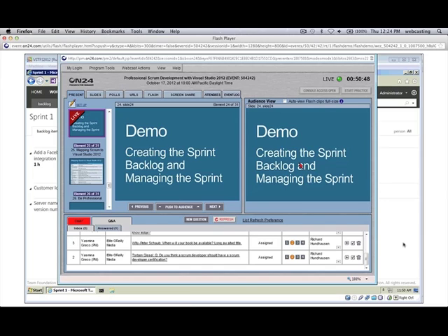Another PSD buddy of mine actually said, I won't recommend that a team brings a piece of work into a sprint, forecasts it and commits to doing it, unless we've talked about it 3 times during the product backlog grooming. So we put our eyes on it and we've estimated it 3 distinct times, and then maybe we bring it into the sprint. That's a good question.